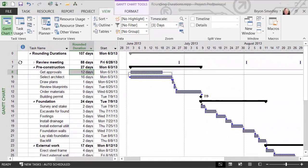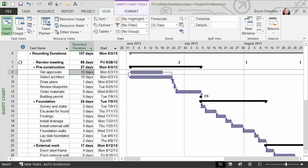As a bonus tip, if you want to use this rounded duration field in all of your projects, you need to move this newly created custom field from this project to the actual programs library.